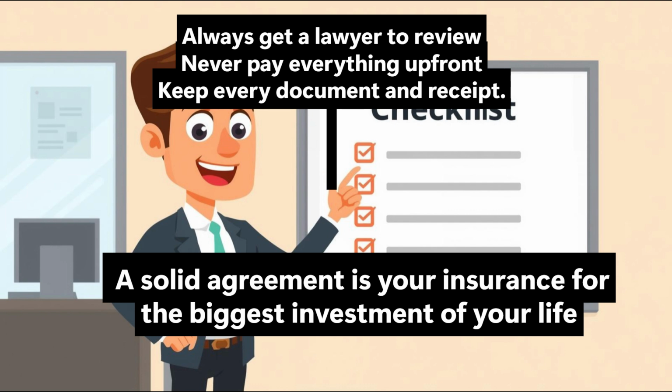Number 2, never pay everything up front. I've seen cases where homeowners gave full payment at the start, and the contractor disappeared after finishing only half the work. Stage your payments based on progress. Number 3, keep every document and receipt. Treat them like gold. If a dispute ever happens, those papers are your strongest evidence.